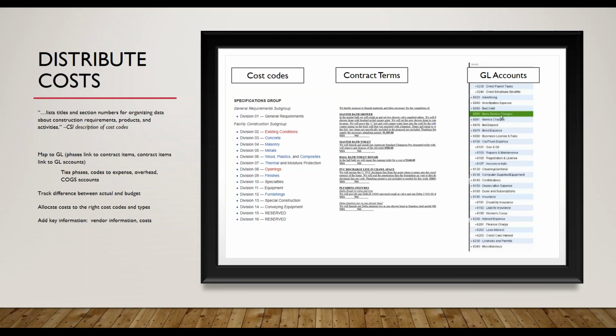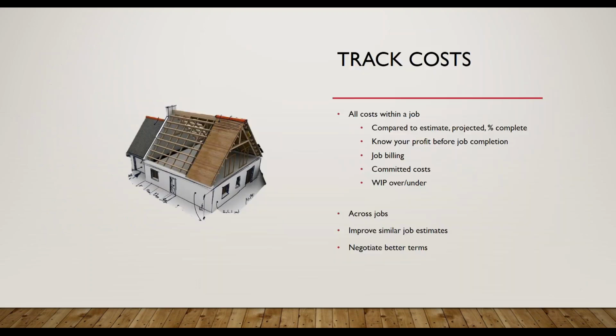Actually, there are job codes in addition, so every job is numbered, like 01 through 100 or whatever you have, 3 digits or 4 digits, depending on how many customers you think you'll have, and just keep counting up and keep adding a new job code. And that gets tacked to the cost code or phase code, and you can track the whole thing. Getting this process down is key and can be painstaking if you've got a lot going on. Luckily, there are solutions which help tremendously.